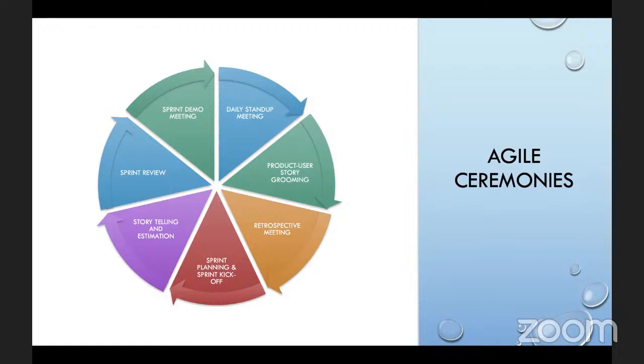The product owner must ensure that all the items in the product backlog have been properly groomed. They are properly written, your stories are complete, and acceptance criteria has been defined in there. We'll be talking about acceptance criteria very soon, right, guys? We have prioritized this. There are no dependencies, or if there are dependencies, the stories or features have been properly identified as well.